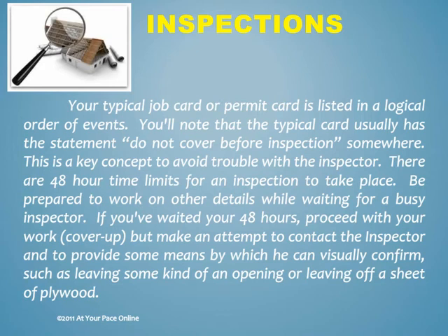There are 48-hour time limits for an inspection to take place. Be prepared to work on other details while waiting for a busy inspector. If you've waited your 48 hours, proceed with your work, cover up, but make an attempt to contact the inspector and to provide some means by which he can visually confirm, such as leaving some kind of an opening or leaving off a sheet of plywood.